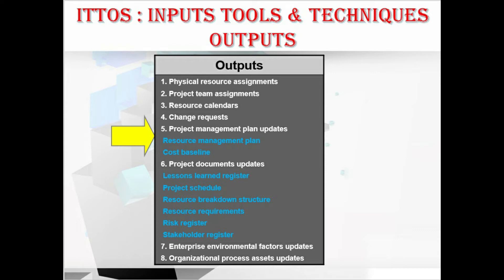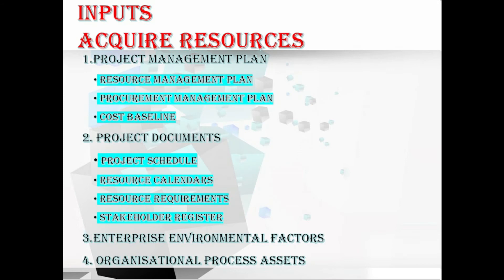Let's discuss the inputs in more detail. The first input is the project management plan, consisting of the resource management plan, procurement management plan, and cost baseline. The resource management plan provides guidance on how to acquire resources for the project. The procurement management plan contains information about resources that will be acquired externally. The cost baseline provides the overall budget for project activities.